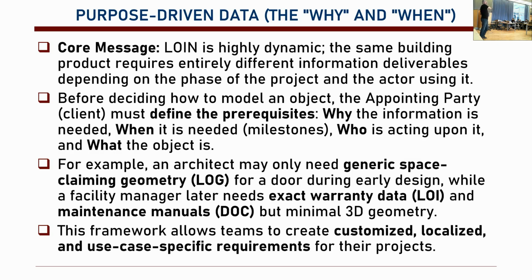Okay, door number 3. And then an Excel sheet. It's a timber door. There are 4 hinges. It needs to be oiled once a year. The lock is this brand. If it's broken, you can replace that. The keys are that type of key, etc. So the facility manager does not need the geometry. We should be able to transfer that information to them in that regard.